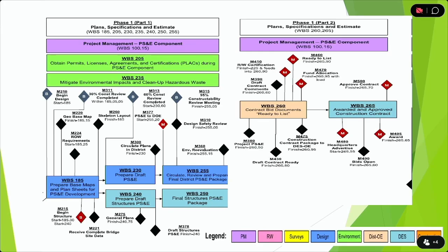Once you're able to get the right of way certification and RTL, after that, it's a standard process that goes through headquarters and different functions. Once you RTL the project, you submit the documents to CTC, and then they'll give you the money for phase 3 and 4. That is the fund allocation, that's milestone 470. And once you have the money, you advertise the project, depending on the scope and scale of the project, 1 million, 5 million, or 100 million, and that advertisement period varies. And then you advertise the project, milestone 480.